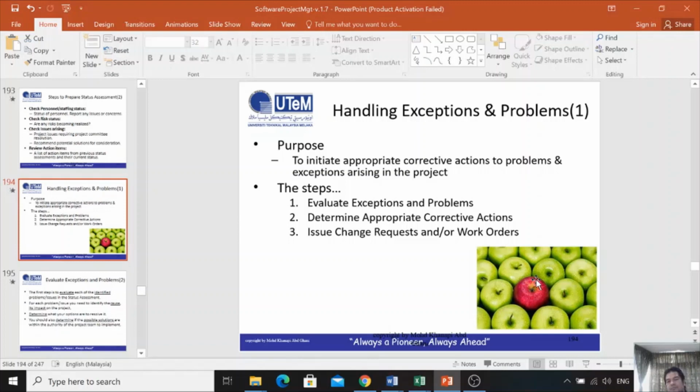And then if the problem is genuine, you issue the change request. It's very easy. Write down the change request, or of course you need to design a standard form to issue a change request in the project. So for any issue or any request, use the same standard form for the user or you to report it and then escalate it to the change management board.